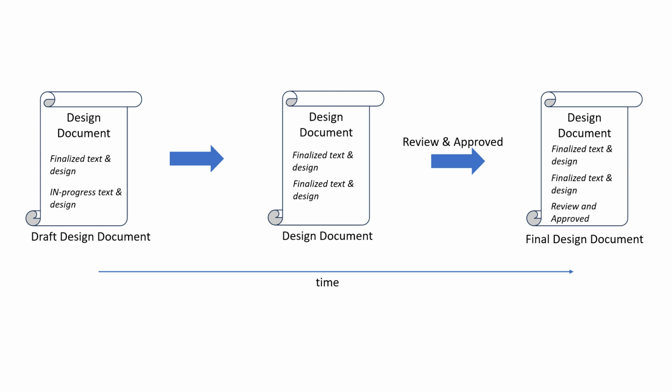They are especially a great help for bigger transformation projects such as migration from one infra to another, digitization of customer journeys, etc. The audience of design documents is not just the development team, but other key stakeholders. Many organizations have governance and have made it mandatory to prepare a design document which goes through a formal review and approval process. If the design has not yet been signed off by all the stakeholders, and if the development is not according to the design documented, then the features developed will not go live.